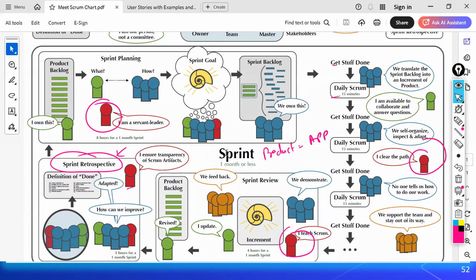But the ideal practice that we have here is that you must do this before you start your next sprint. Because every sprint you have to evolve, you have to make those improvements so that you can go super effectively in your upcoming sprint. That's all.